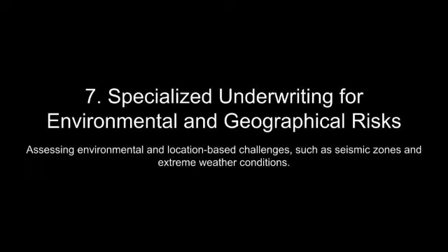Case studies on recent legal rulings provide critical insights into the evolving interpretation of bond obligations. In United States, XRL CRA Builders, LLC vs. Gulf Coast Construction Group, LLC, 2020, the court clarified the scope of payment bond coverage under the Miller Act, emphasizing that suppliers furnishing materials to subcontractors were entitled to claim against the bond even when they had no direct relationship with the prime contractor. This ruling reinforced the broad protective intent of the Act, but also highlighted the need for underwriters to carefully assess the supply chain hierarchy when evaluating bond risks.